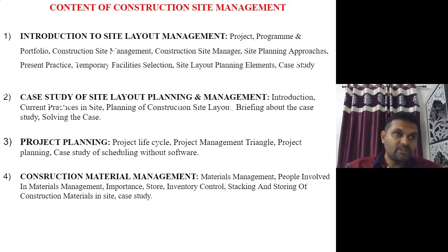First I need to decide where exactly I'm going to have my building, where exactly the cutting bending yard, material storage yard, entrance, exit, and batching plant will be. I need to decide the location. I need to decide the layout of different elements. So that will be the first thing we need to do in the planning, and that we will do in today's session.